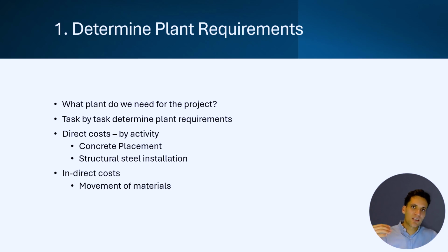And you're really going to have to go task by task through this list and look at each individual specific activity and allocate the appropriate bit of plant. So if you go back to my example of what happened with the train station we're working on, they didn't follow that step properly. They didn't look at the specific methodology behind how we were going to have to auger the light pole foundation. So that's what got messed up there.